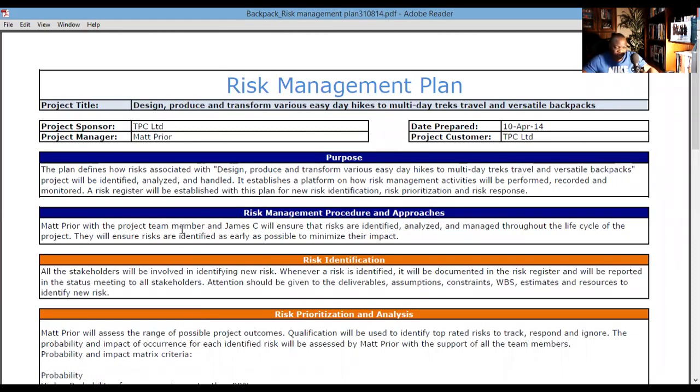When you are in plan risk management, be aware that not only are you getting your plan for managing risks, you're also getting an overarching risk management strategy, so to speak. And your risk strategy, for example, could be if any risk is identified that could jeopardize our go live date, it will be communicated immediately or escalated immediately to senior management. That's a strategy. It's an overarching strategy.